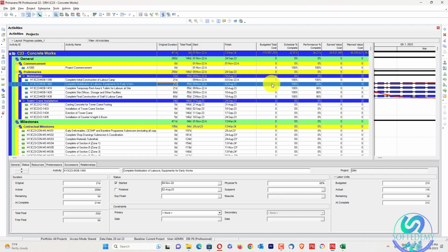Your client will ask you, as per your contract, there are different types of contracts, and in every type of contract, the engineer or your client or consultant will ask you to recover your project. They will tell you to create a corrective measure, create a mitigation measure, and submit a new plan to meet your deadlines. That type of schedule is a recovery schedule.